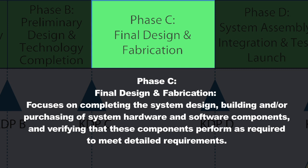The thruster has to plug into the system and interact with the power system and the rest of the propulsion system — those interfaces were defined in requirements. You want to make sure that the thruster you purchased will be able to meet all those interface requirements. In this phase, you're not actually building up the satellite yet; you're just procuring the individual components and making sure that they meet their requirements. The actual building of the satellite comes later. At this point, your verification is all being done at the component level.